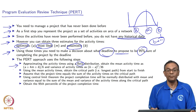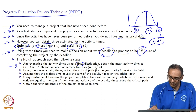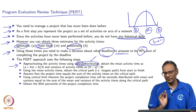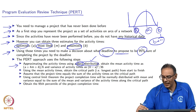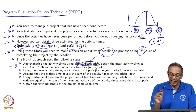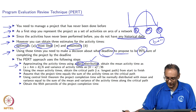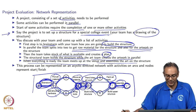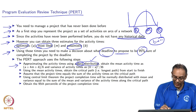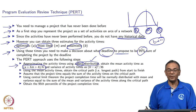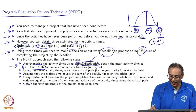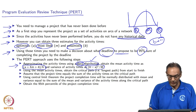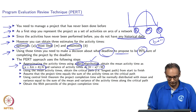The PERT approximation uses five steps. Step 1 says we use the beta distribution for the activity time. The real reason is that given A, M, and B, we can compute the mean and variance of each activity time. The mean is computed as (A + 4M + B) / 6, and the variance as (B − A)² / 36. Once we compute the mean and variance, the beta distribution part is no longer needed.